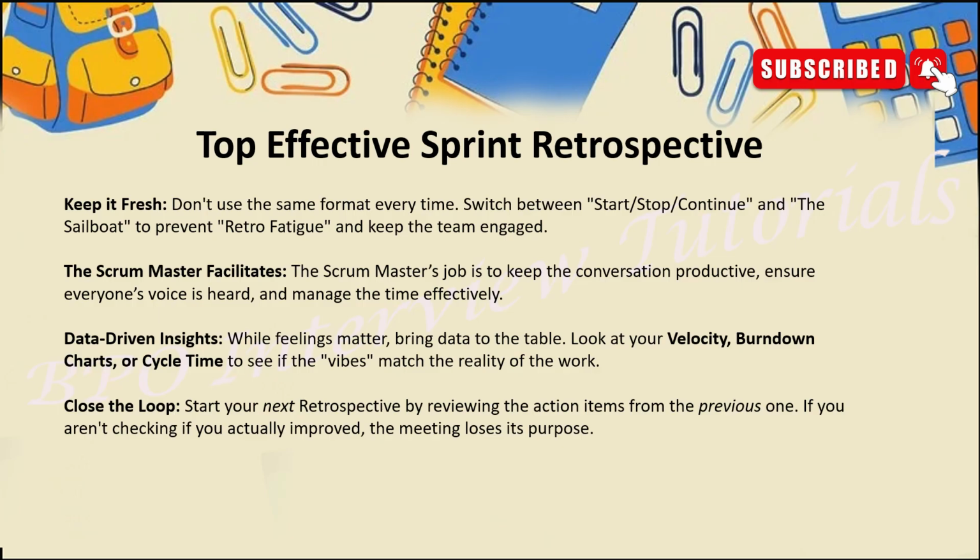Now the scrum master facilitates. The scrum master's job is to keep the conversation productive, ensure everyone's voice is heard, and manage the time effectively. This is the Scrum Master's responsibility. Self-explainable point, guys. That's the reason I'm not explaining it to you. Next, data-driven insight. While feeling matters, bring data to the table. Look at the velocity, burn down chart, and cycle time to see if the vibes match the reality of the work.